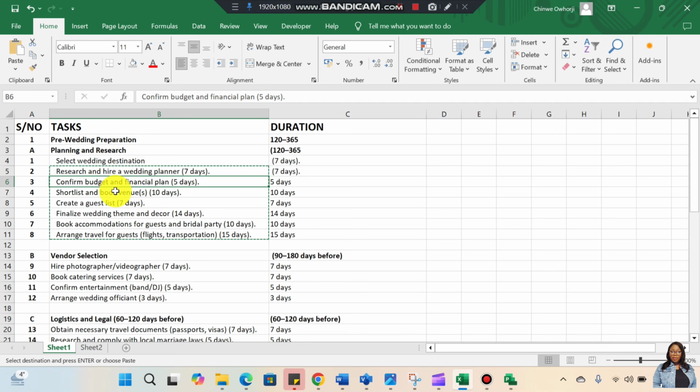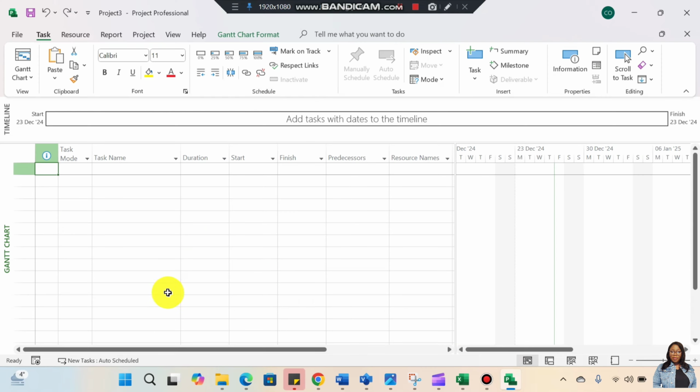So I'd like to work out the tasks, what needs to be done, put that on an Excel sheet, of course, together with the team, because other teams will be submitting the tasks that they need to complete as well. So I make sure I have that on one single document before I transfer that over to Microsoft Project. Okay. So let's go back to Microsoft Project.